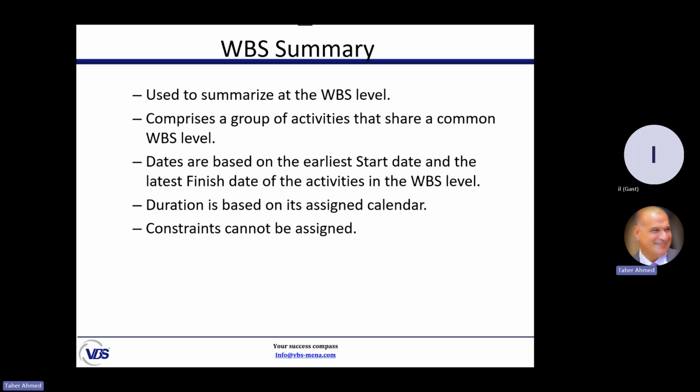By the way, this is not there completely in Microsoft Project. Microsoft Project has 2 types of activity only, task dependent and milestone. Here we have 6 types of activity. Choose one of them as a default for new activities. We usually use task dependent. Why? Because almost 90% of the activities are task dependent.